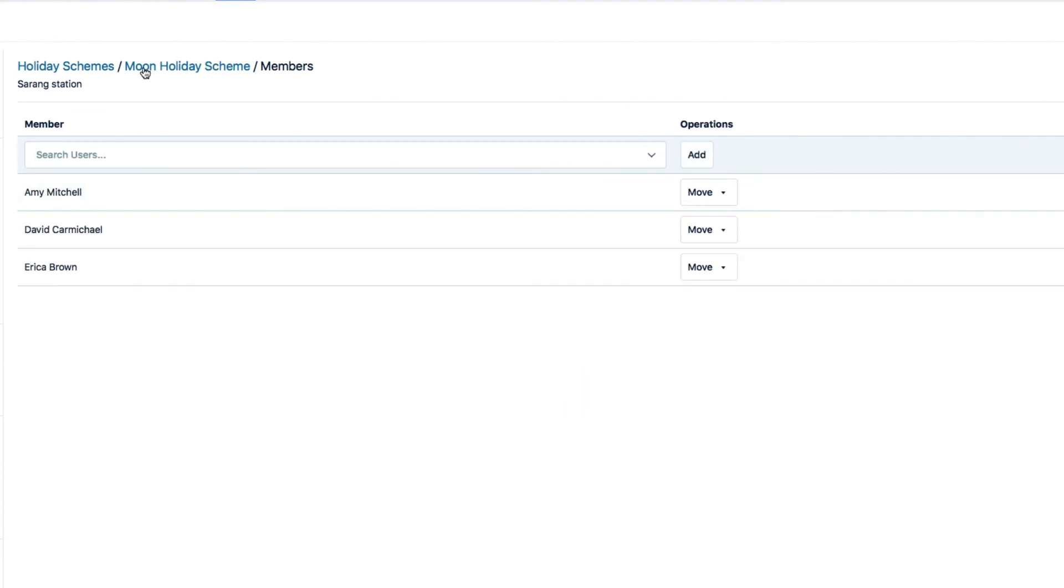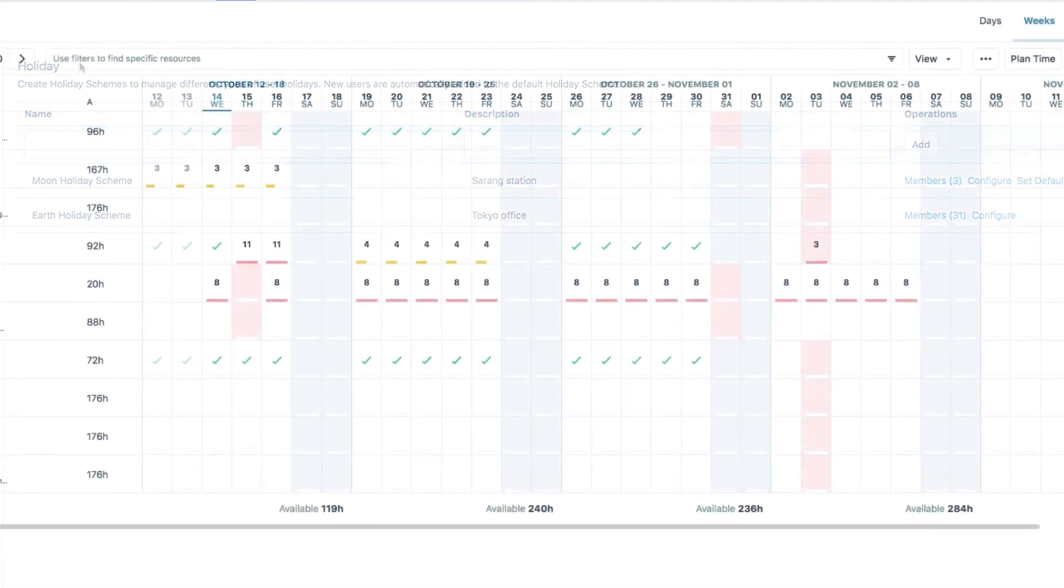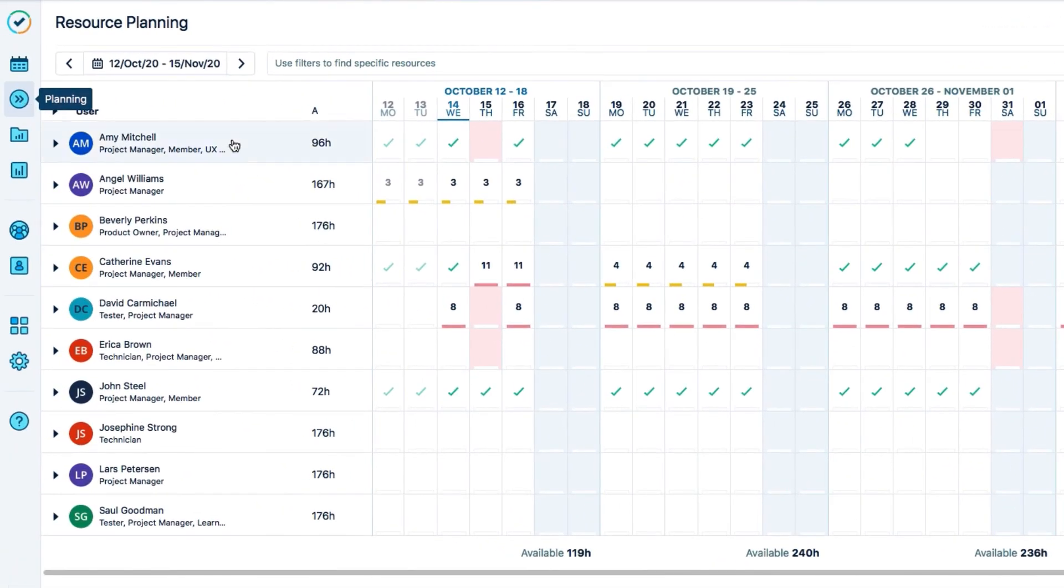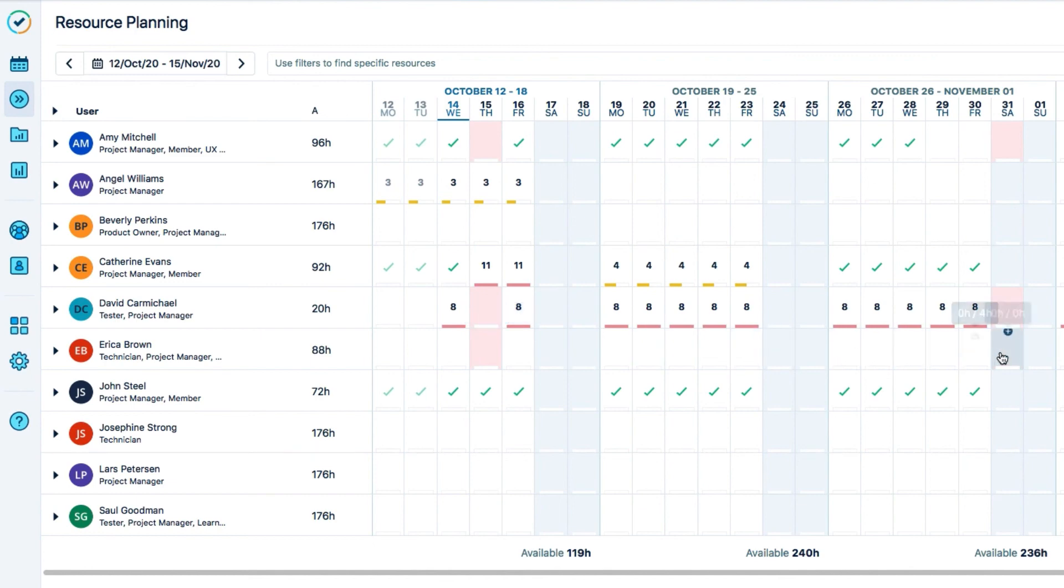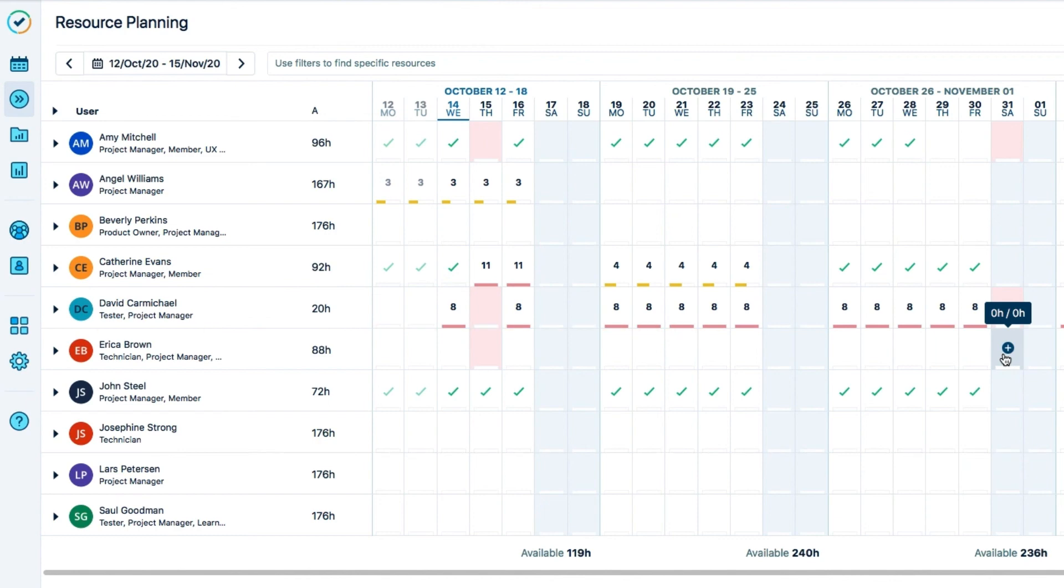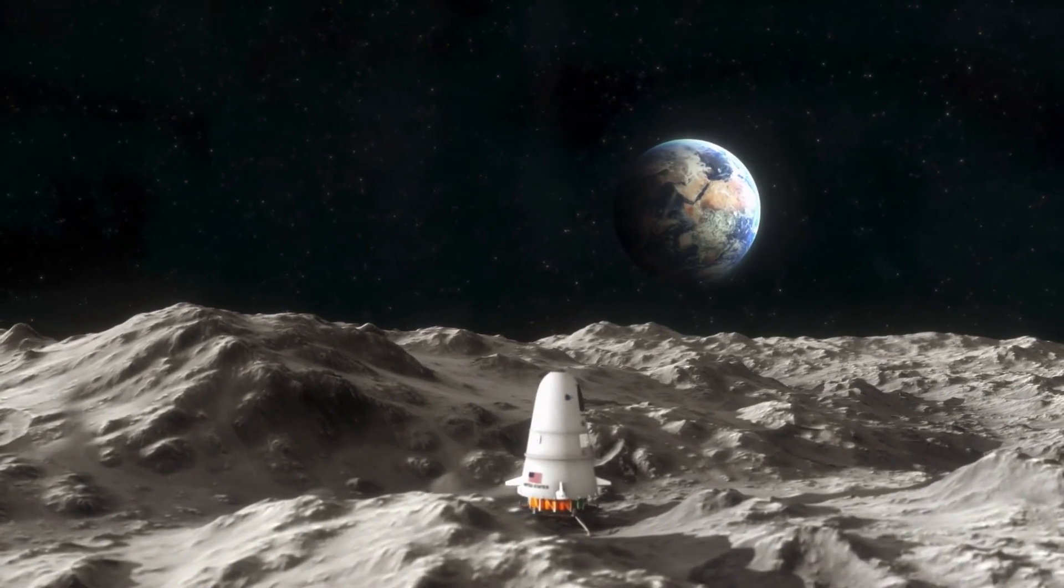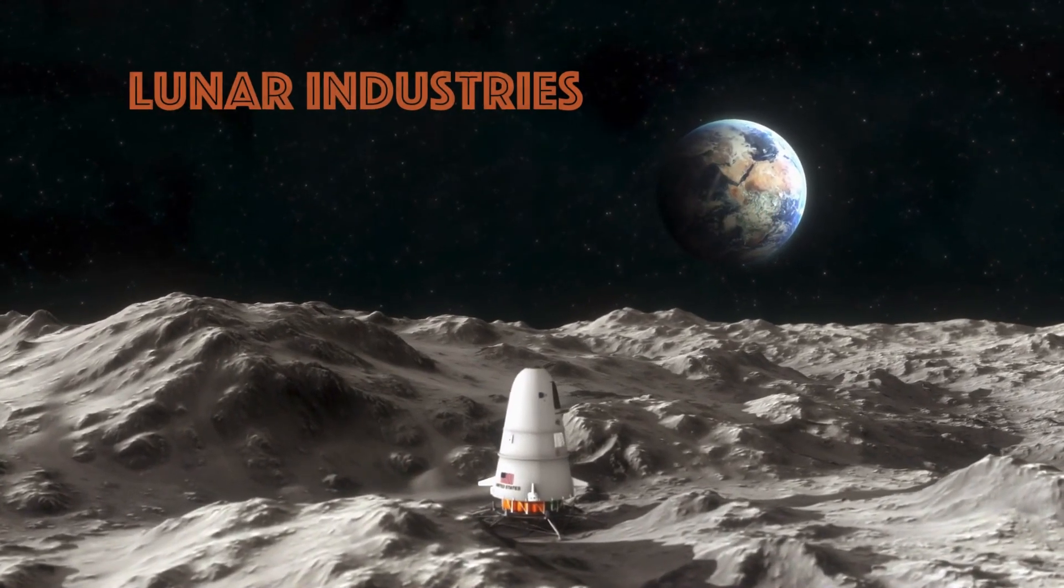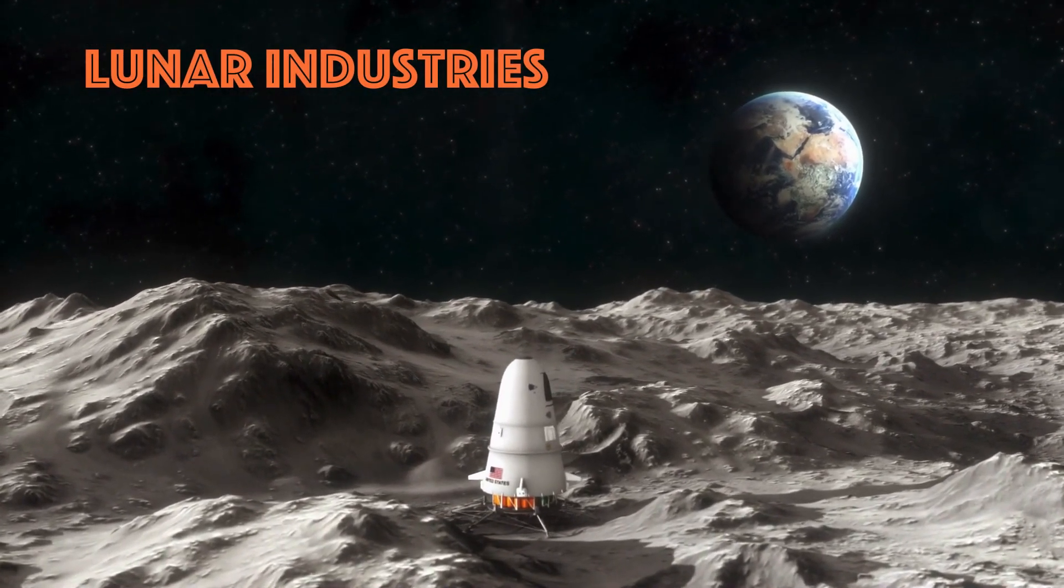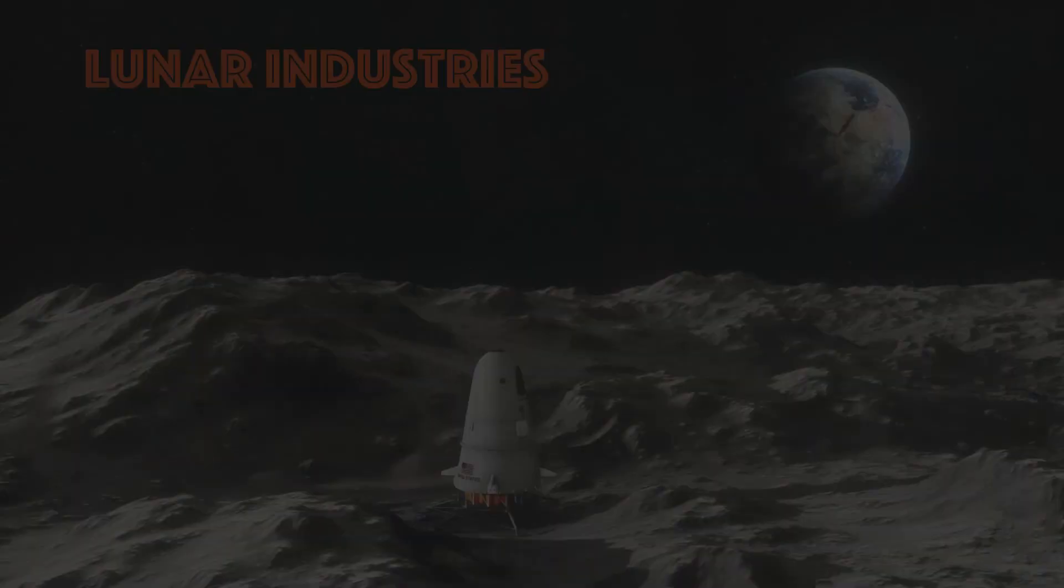So let's go back to Planner, for example, and see how the moon workers, Amy, David, and Erica, have their holidays defined here in pink. And you see that David is now overbooked at 8 hours per day because his workload scheme says that he's part-time. My work is done here because all the employees at Lunar Industries now have their working capacity correctly defined by their workload and holiday schemes.